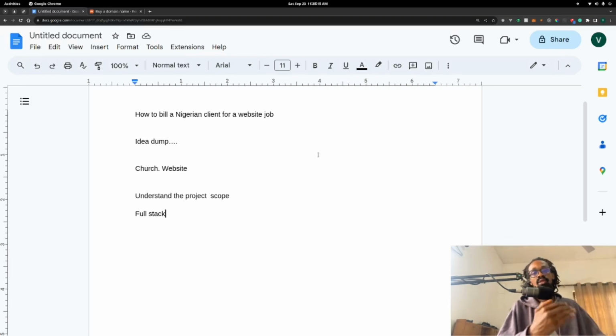So the best way we can quantify this is milestones, and then from the milestones we draw, we decide when we have come to a minimum viable product for them, how long it will take, and how much you will charge per milestone till you get to the minimum viable product. After the minimum viable product, you can now talk about what you're going to be charging for maintenance and upgrades, which will still be feature based, right?